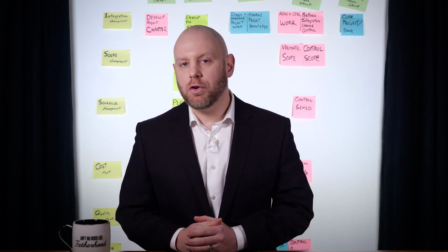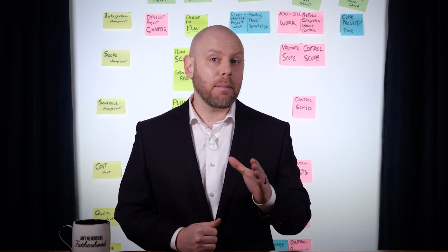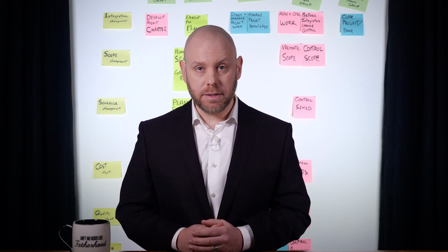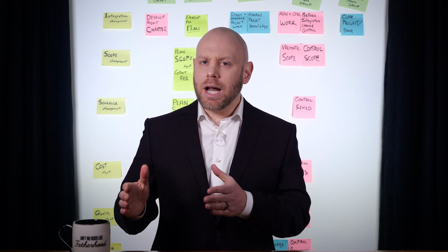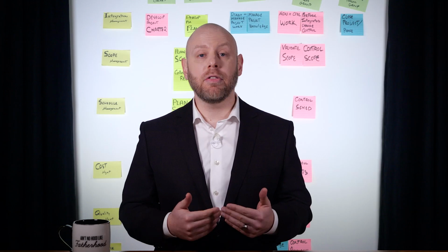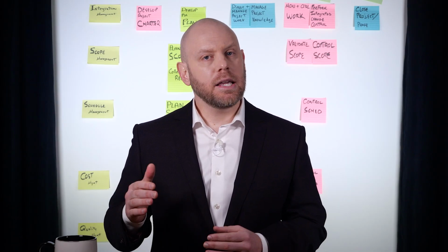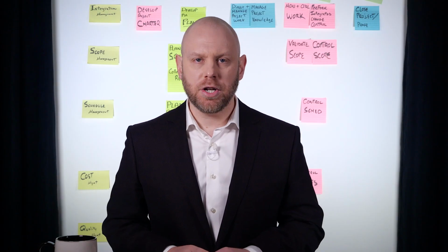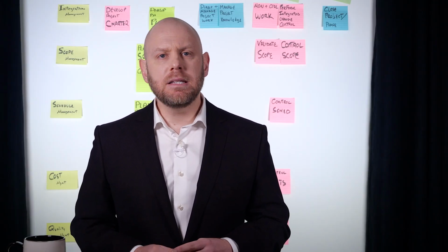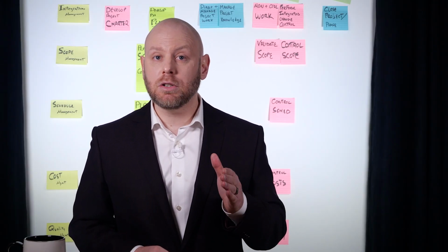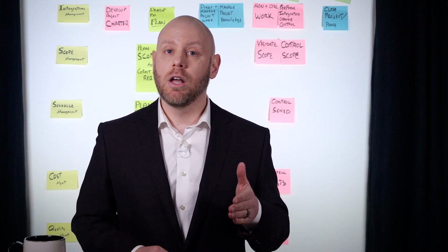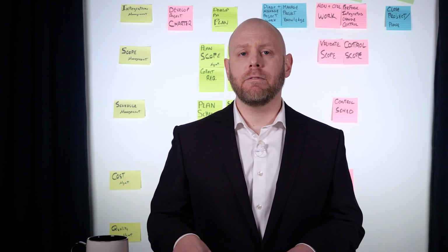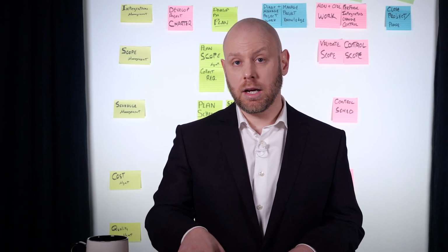After you've finished brainstorming, surveying, and tapping into that talent pool of expert judgment, you'll have your list of requirements. If it helps, break them down so you can better understand their importance. Business requirements can be framed strategically and serve as a North Star for the project. Stakeholder requirements can be tied to various stakeholder groups and especially important when discussing clients or those that we serve. Solution requirements are the specific functional or behavioral qualities that the product needs to have.